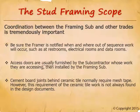Cement board joints behind ceramic tile normally require mesh tape to provide a suitable substrate for the tile installation, but this requirement isn't always in the design documents. The design team may hold it's a means-and-methods issue, while the general contractor argues it should be in the design documents. Either way, we need it. Including this in the bid instructions avoids the argument. This is another good candidate for a pre-bid RFI on a hard bid project.